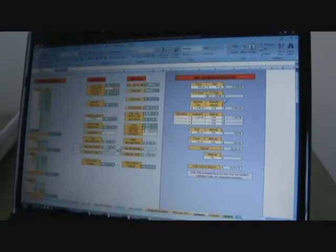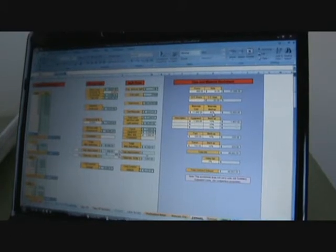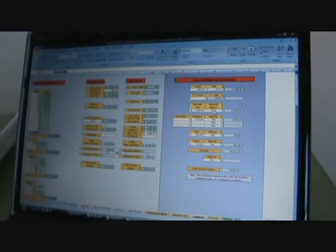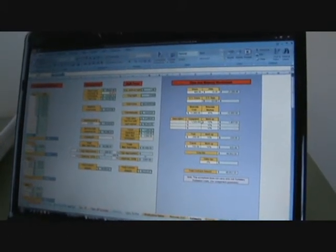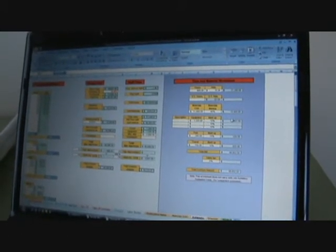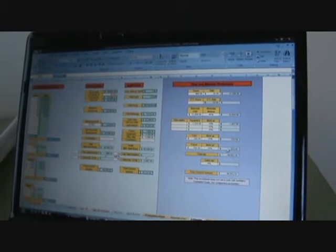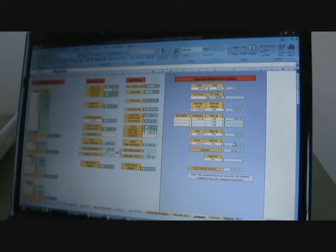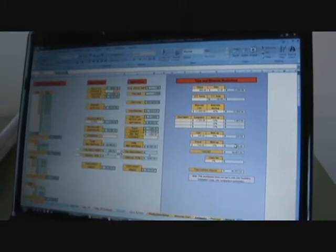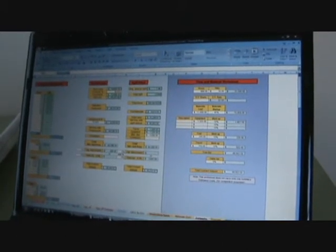There's your labor at retail price. You could put overtime in here, your material at cost with a markup on your material, and equipment with a markup, fuel, and travel. So I figure my estimates usually out three different ways, compare them, and usually I'm pretty close.